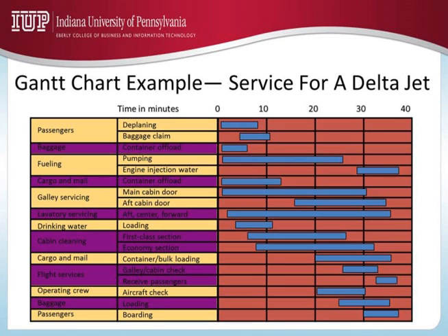Also, I cannot easily make decisions, such as if I have the same crew which is cleaning the cabin as well as servicing the lavatories, I cannot see the impact of missing one person out of the 6 people that are supposed to be in this crew. Or if one of the activities is taking longer than expected, how can I reallocate the resources? Those types of questions cannot be answered easily in the Gantt chart.